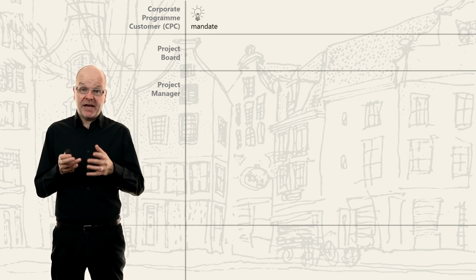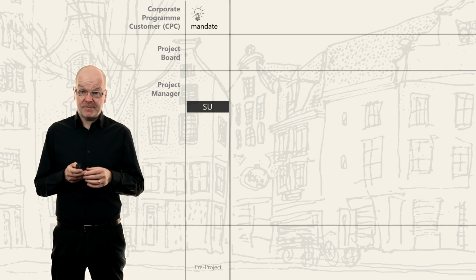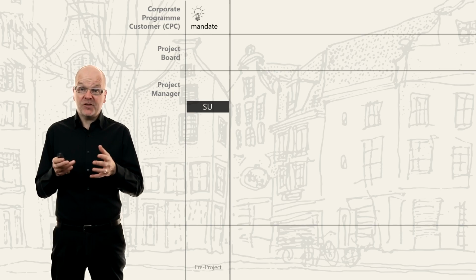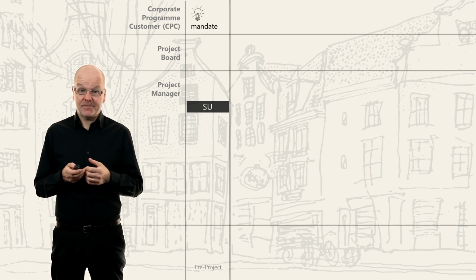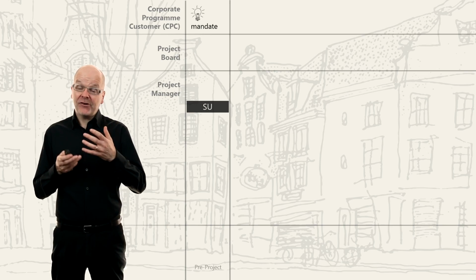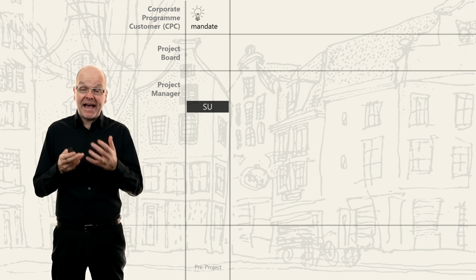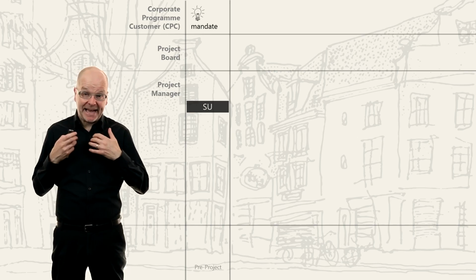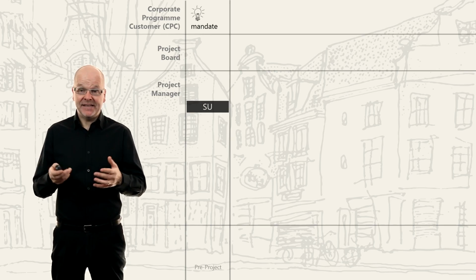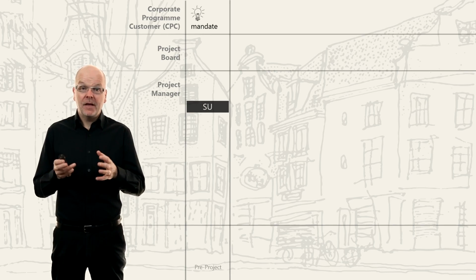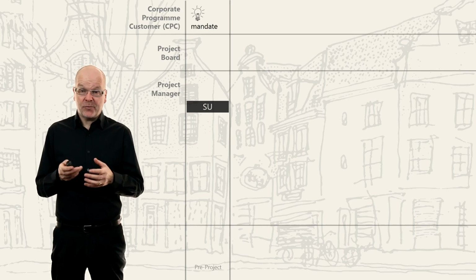The first process in a project is the SU process, and the main objective of this process is to review these ideas and see if they're worth doing. For example, for every great 10 ideas that we might have, only 2 may be chosen to become projects. So you know that an organization has to spend its money wisely, so we cannot spend it on just every idea that comes up. The full name for this SU process is the starting up a project process.